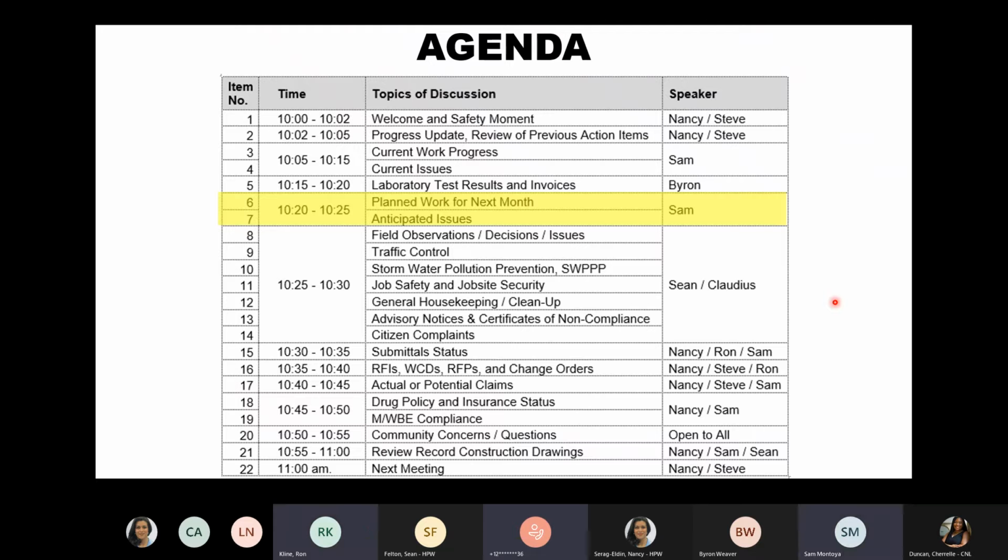We will install the last of the water line and the sewer line that's down there on the edge of 59 in phase 6, and we'll begin construction on phase 6. We anticipate 5D will take us probably the rest of this week to complete, and then we'll jump on that. We'll complete all the wet connections that are necessary right here at the Footerama. There's 2 wet connections and that fire line connection that we've got to make. We'll make those, and we'll abandon the old water line.